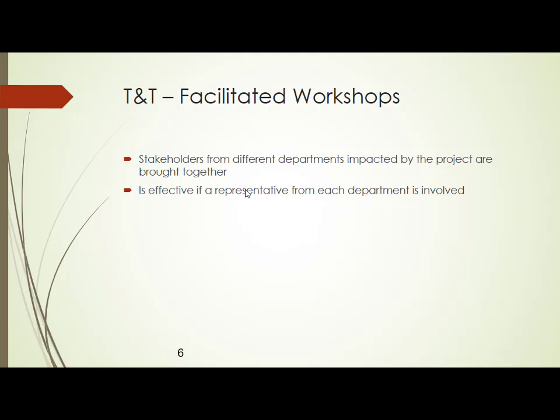The Government of Karnataka is one of the stakeholders, because they are the people who are influencing the project. The customer is also a stakeholder. Then you have Karnataka Power Transmission Corporation. They are also stakeholders, because they can influence your project, as they have to shift the power transmission lines. Similarly, BWSSB are also stakeholders. Then the Land Authority of Karnataka are also stakeholders, because they should help you in acquiring the land.